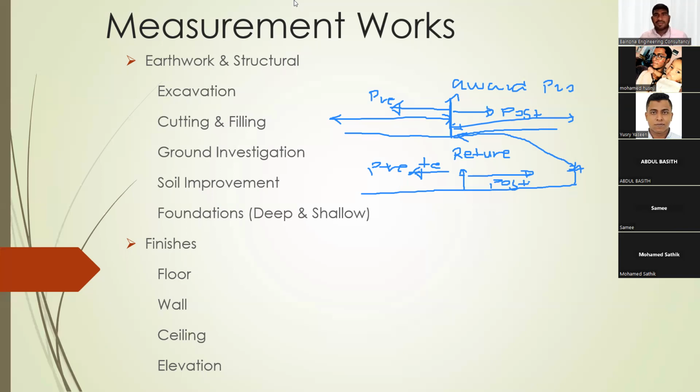Okay, that we call audited financial report. Normally we ask for 5 years, or we can say 3 years of audited financial reports. Each company in UAE, according to UAE law, has to prepare a financial report which should be audited by a third party. That auditing company should not be in-house auditors. There should be an external, independent auditor, so they cannot influence the report. That report should be independent. That is what we call an audited financial report.